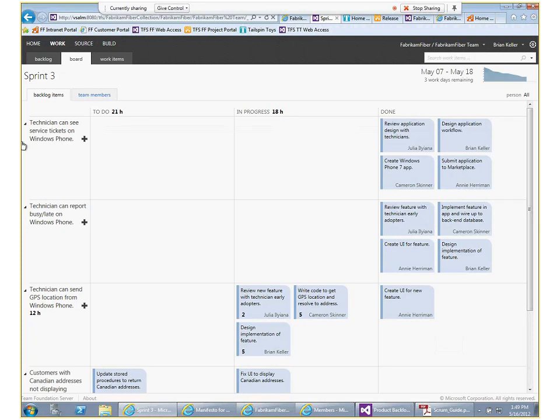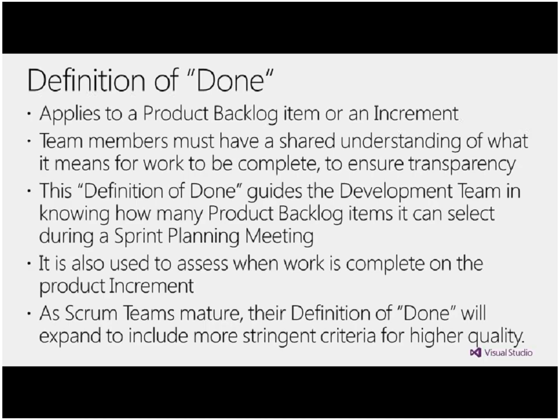And now let's go back a little bit to our deck, and think about what we just saw. So this definition of done, right? I'm able to look at my code as I create a build and that build gets tested, and it gets tested and associated with my particular set of test cases. I also saw how those product backlog items are mapped to tasks. And as the tasks progress from to do to in progress to done, I know that the tasks are done now. Does it work? I validate, and then I can close that PBI and mark it as done after looking at my own done criteria that I recorded a month ago or 2 months ago.